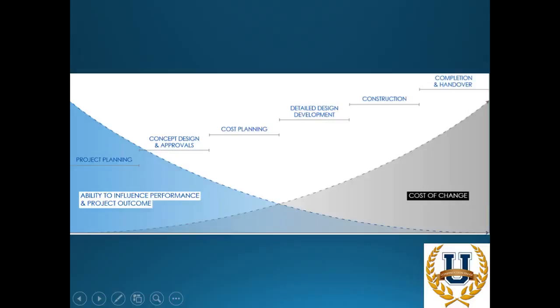If you're going to introduce a value engineering idea at project planning stage, the impact of that in terms of time or potential disruption or delay to the project is minimal, if not completely nil. Obviously, the more you work through the construction cycle, if you get into the construction phase and you start wanting to change the air conditioning specification, it can have a major impact way over and above the cost saving or time saving that might be introduced by that specific element in isolation.